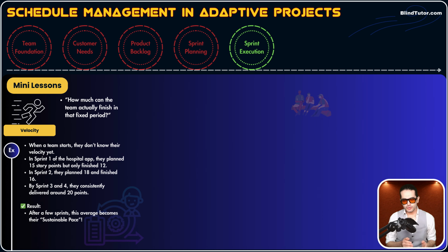All in all, guys, remember in the product backlog creation part, we had product roadmap and release planning, okay? To come up with those two scheduled documents, we use team velocity. But that early velocity that we came up with in early days of the project is not reliable. As I told you before, it takes time. You need to constantly update release planning based on the new velocities that come. Okay, awesome. So velocity is number of user stories a team could complete in one sprint.